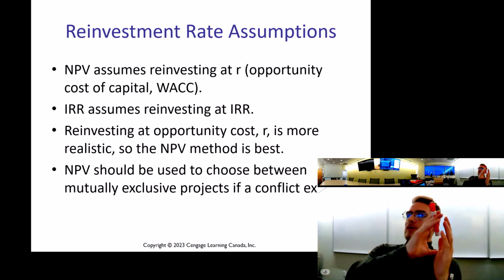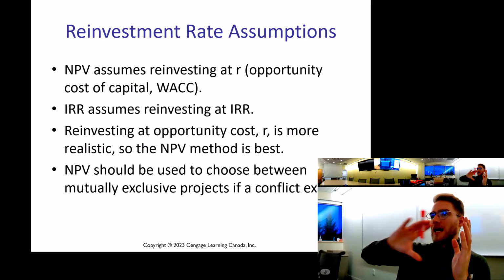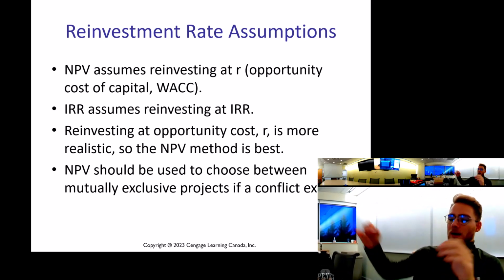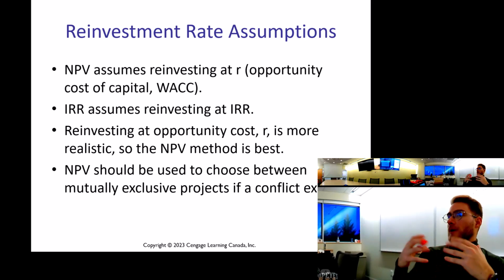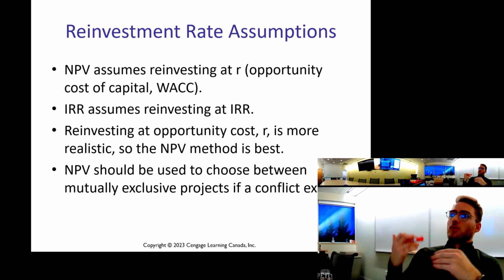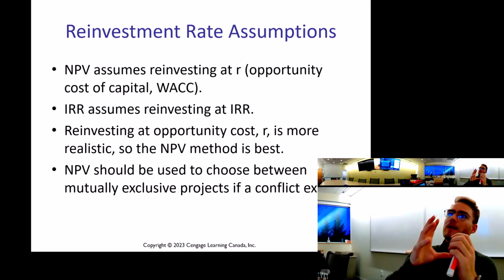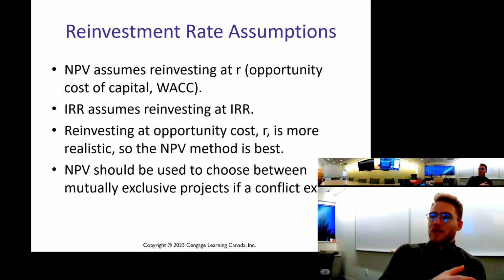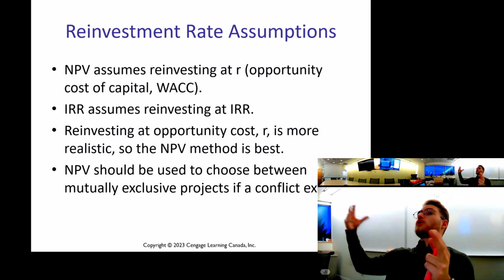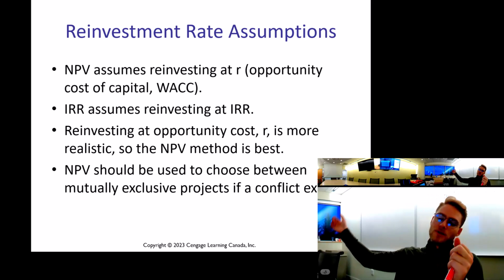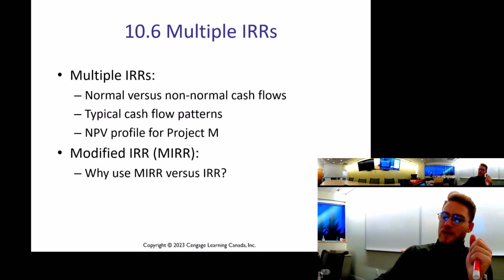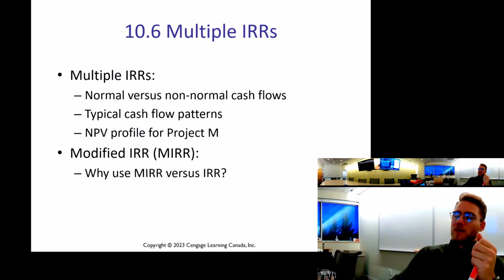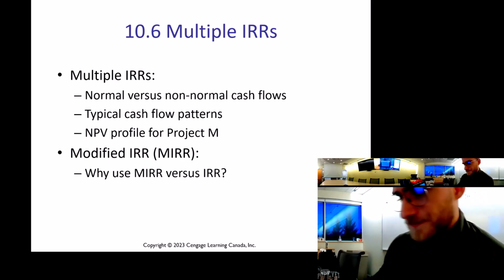It will future value all those cash flows at a different rate, and then it will bring down the rate of return of the project, but it's more accurate because it doesn't assume that, on a 14.5% project, you're going to reinvest all those cash flows into another 14.5% return project. I'll show you a little more of the math behind that, and it should make more sense. That's high level what it is, though.